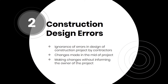Construction Design Errors. Sometimes contractors ignore the potential errors in the design of the project, which ultimately leads to cost overrun in construction projects. It is because errors in design need to be corrected during the construction phase, and for this, many changes in the architecture might be made to eliminate defects. Generally, the design errors are made intentionally while the project is in the planning or architectural design phase. But sometimes contractors make changes in the project without informing the project owners, which is critical damage to the construction projects.